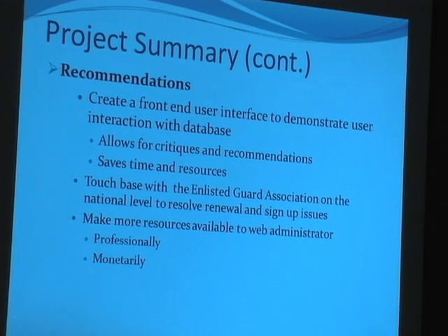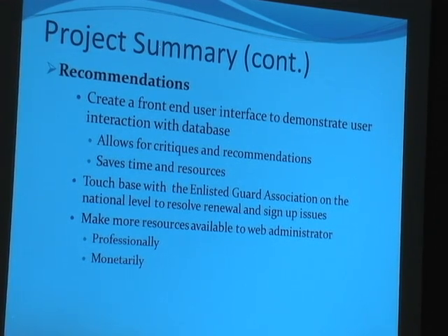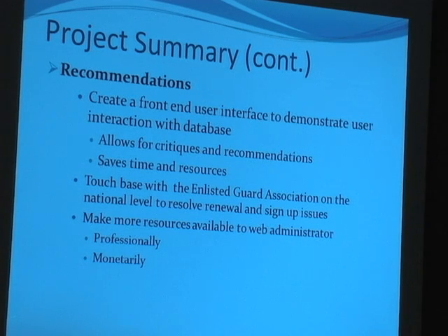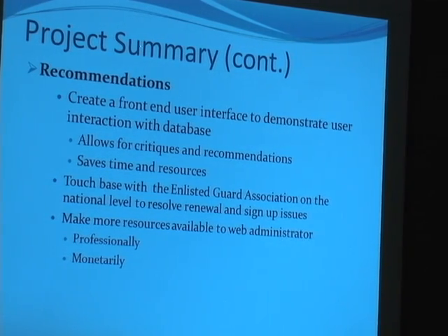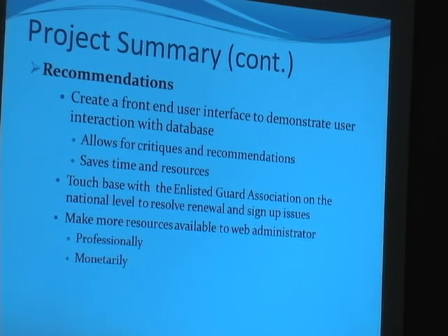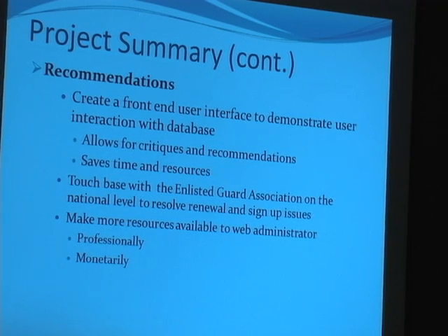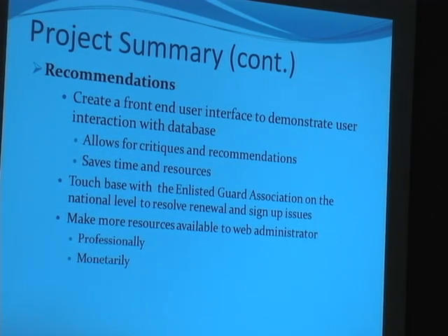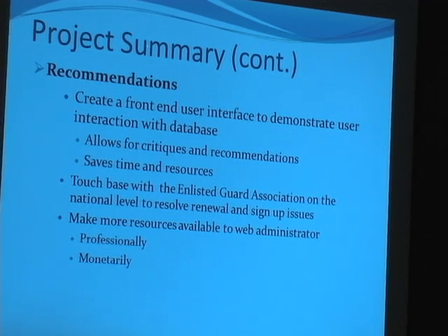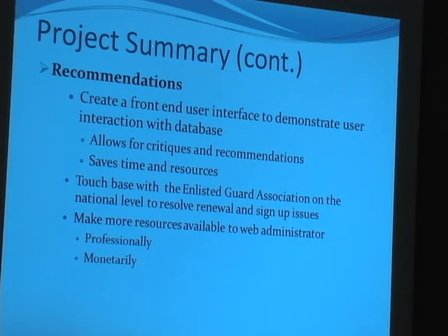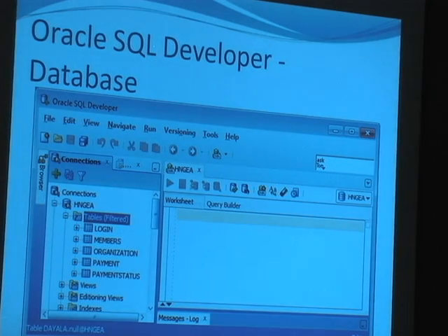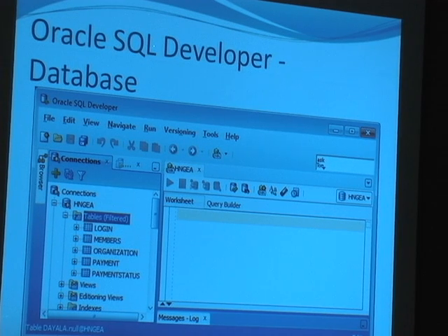Recommendations for those who want to repeat something like this: create a front-end user face. Because this project is done in conjunction with the IS 6050 database class, the database class is not responsible for the front-end user, so there must be better communication with that. Of course that would save a lot of time and budget, when you go into working using man hours for that. Okay, and Dana would talk about the database itself.